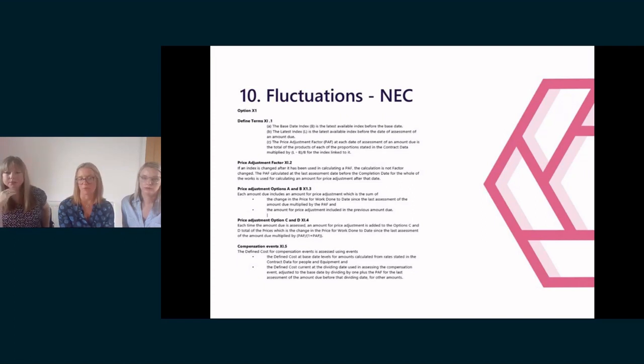Now, before I come on to PCGs, etc., one way we have found is shortening payment terms. It's never going to feel completely safe, but clients are looking for a shorter final date for payment. Some people talked about fortnightly payment applications, but that's quite tricky to administer. We've definitely seen a lot of shortening of payment terms, and also dealing with suspension. I think you've found that a lot of people are getting more on top of the lack of payment by the final date for payment.